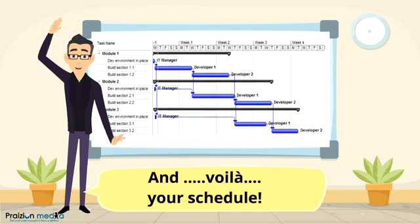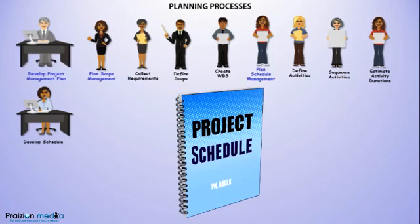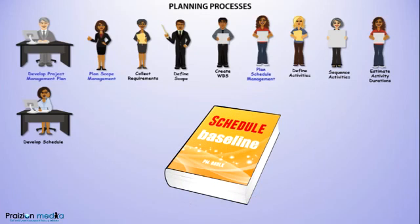The next process is Develop Schedule. This is where the entire schedule comes together and all of the information gleaned so far about milestones, tasks, and durations is put together into a project schedule. When that schedule is approved by management or stakeholders, it is then known as a schedule baseline.